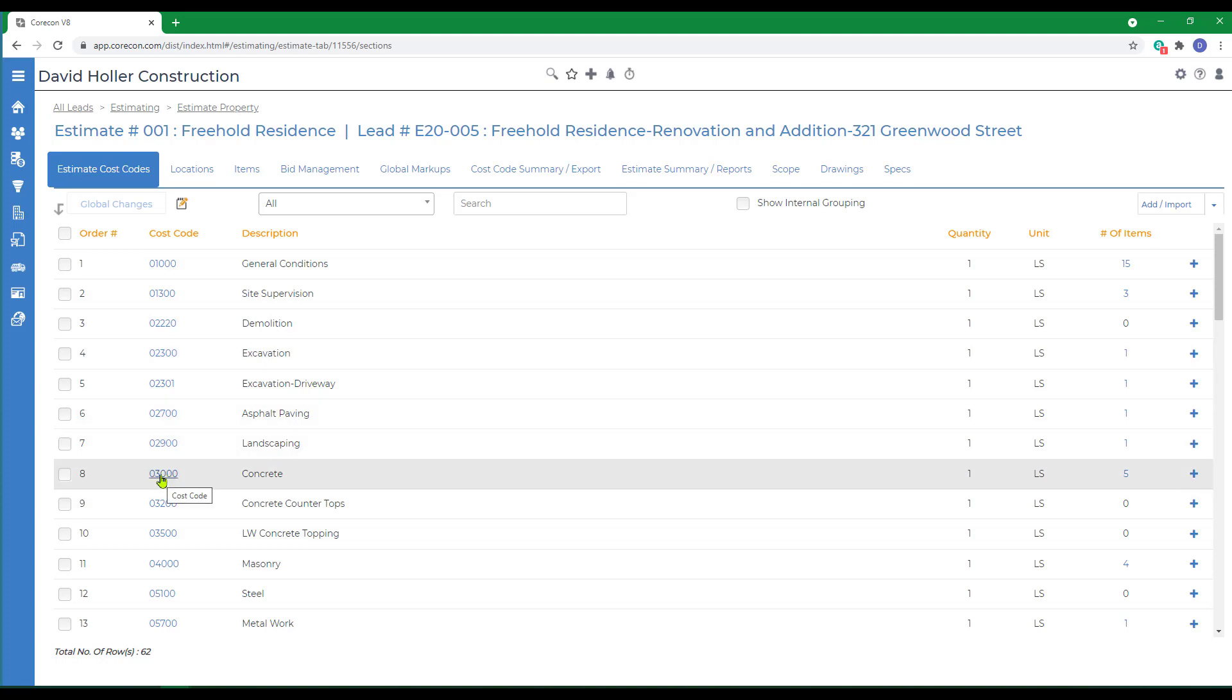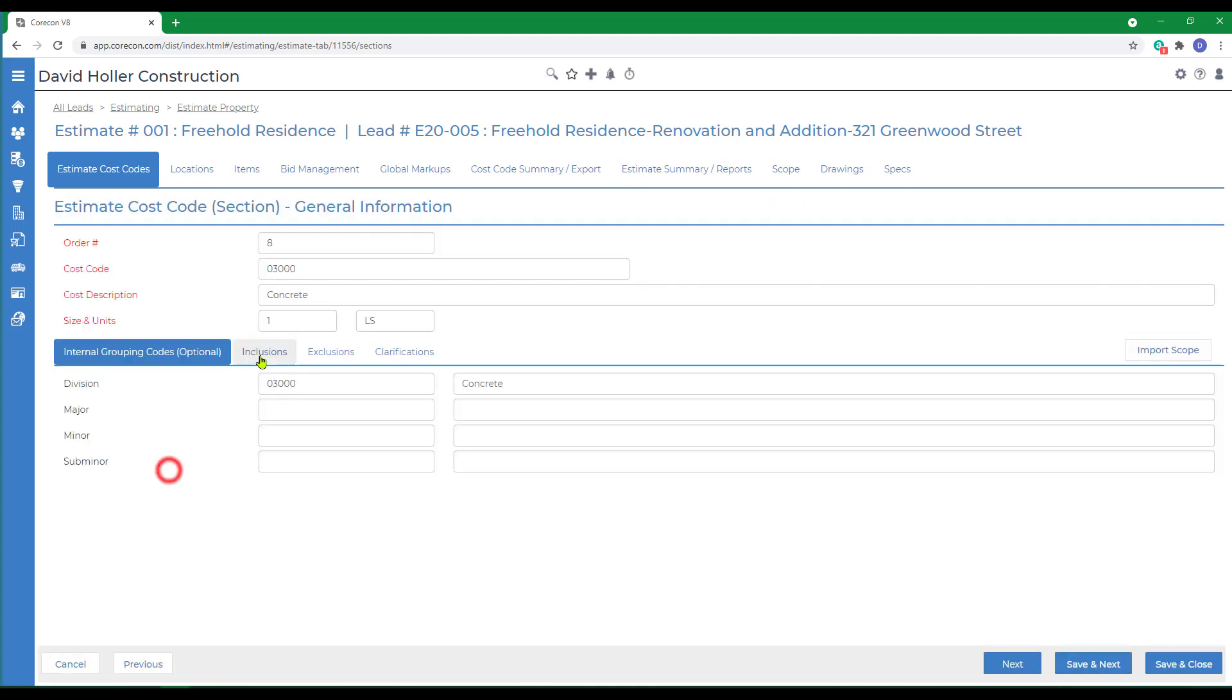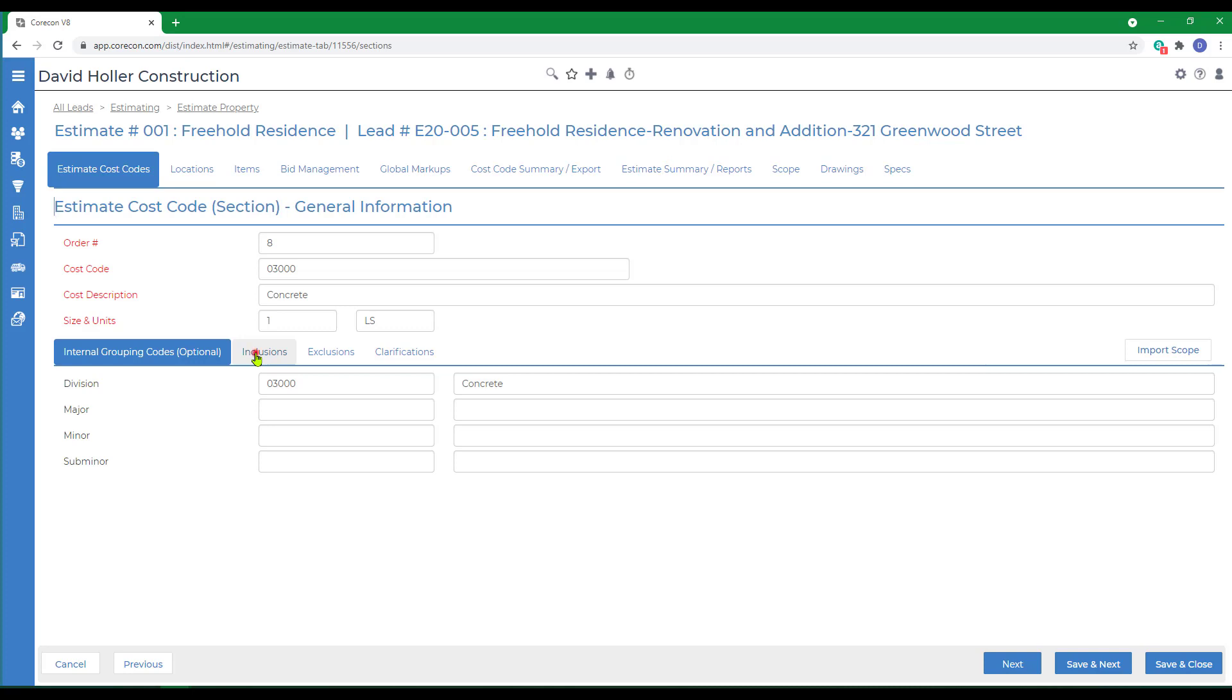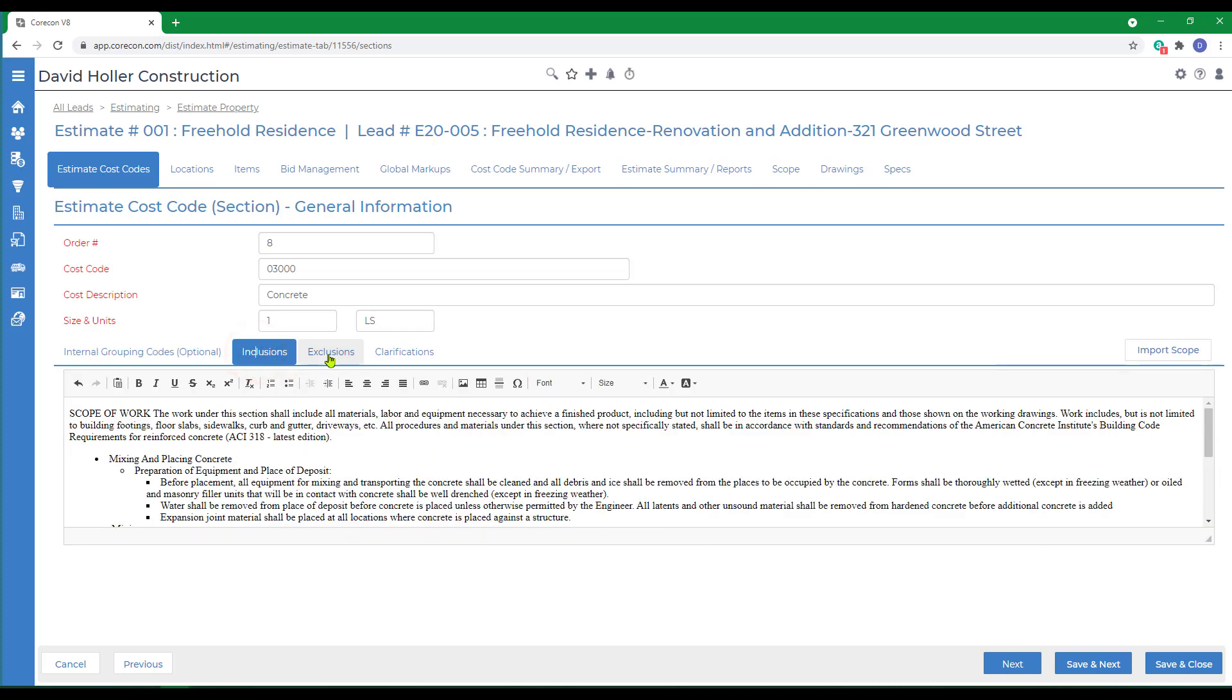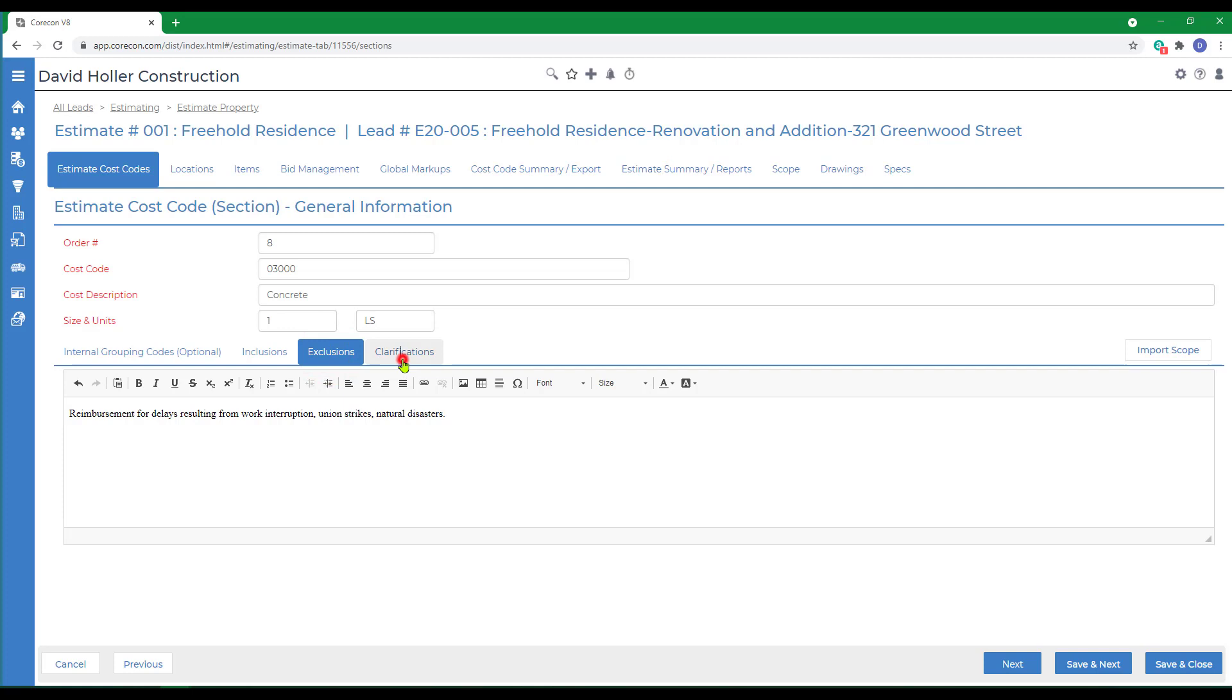If you go down to the cost code, in this case concrete, cost codes can have the ability to include scope of work at the cost code level. If I click on Inclusions, you can see I've already added the scope of work for a concrete subcontract. If you use the same scope of work over and over, you can create scope templates in global settings under Templates and Reports.